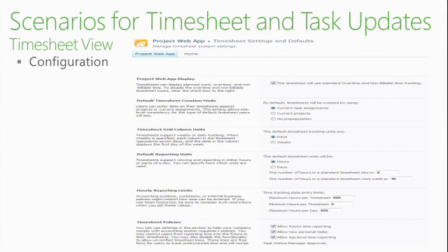Yeah, I know. I didn't know if the overtime fell into this. No. What you would do if you wanted to really limit the number of hours would be to use the hourly reporting limits there. Instead of 999 per day, you would put 12 or 16 or whatever. Or 24, or I only want people to report 8 hours a day. Right. But if they work beyond 8 hours, I want to know about it. Yes. And I guess the only way I would know about that is if they put in OT. Yes, or you would know when you approve, basically, as a timesheet approver, when you approve the time, you will see that showing up, what they are sending you as an update.